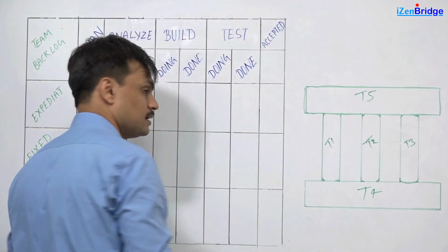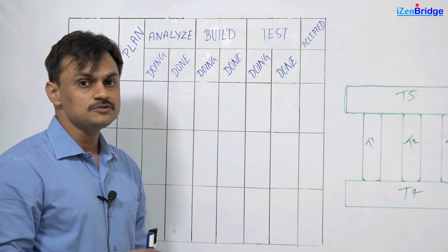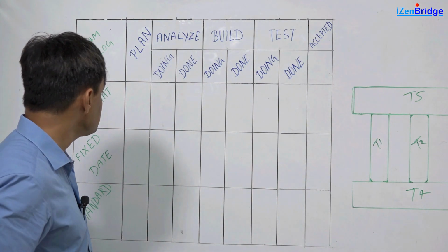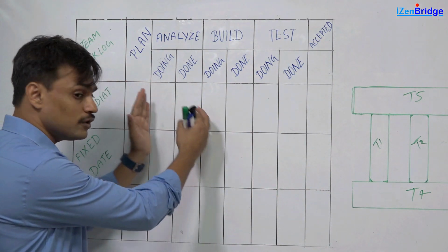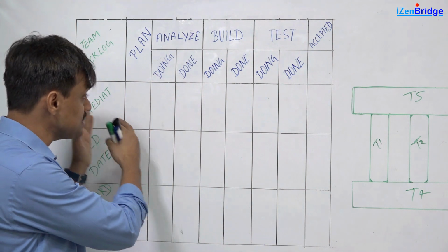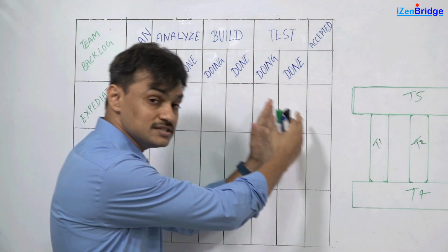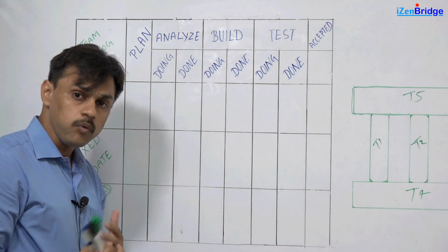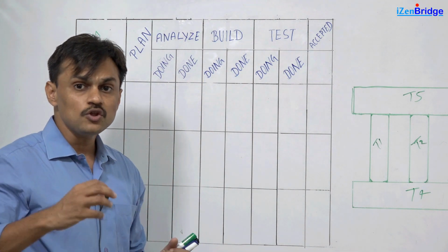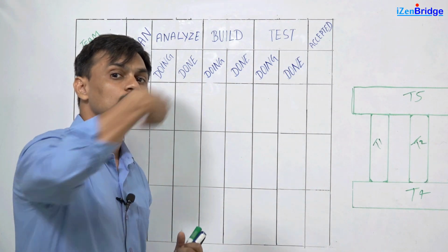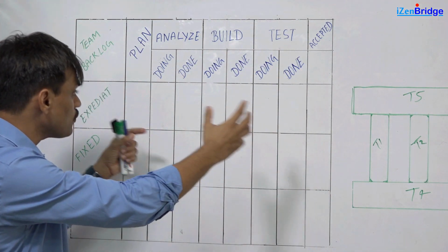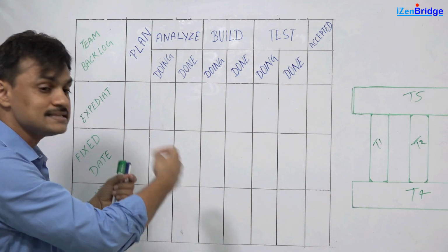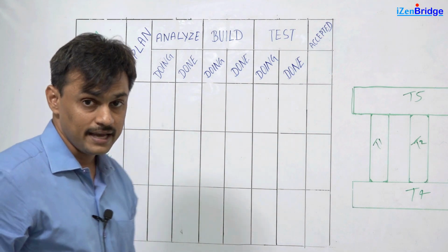Kanban, as understood across, is more about visualizing work and workflow. In a Kanban space, we create various workflow stages which helps us in seeing how the work is moving from one stage to another stage. Kanban system also creates a pull mechanism by which it's not necessary for one person to assign work to another person. The visualization of work, visualization of inflow can make people act, and they can assign their own work as they find capacity.